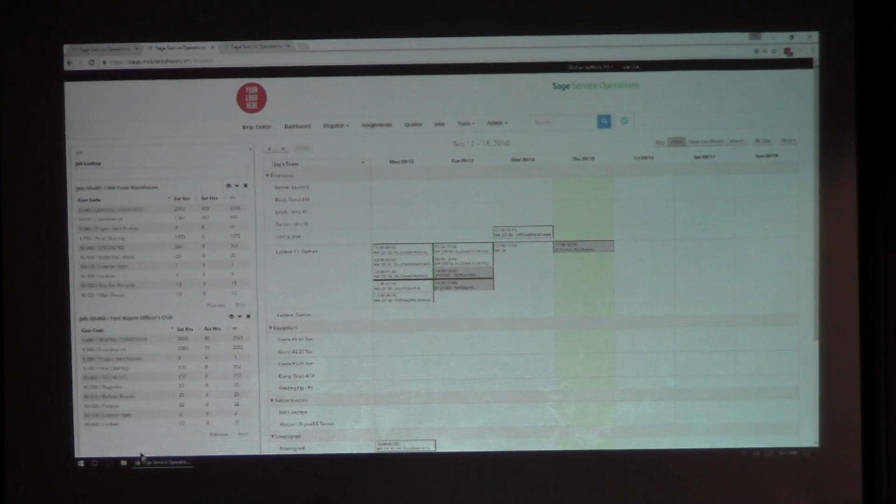So in this case, I'm showing on the screen here 2 separate construction jobs. Let's say I'm a project manager, I'm managing both of these jobs. I have the availability to see what's the total estimate, what's the total number of hours labor-wise we're estimating for this project, what's the actual hours incurred to date, and what's our delta, what's left in the schedule. So I have a sense of how much labor we need to throw at this project.